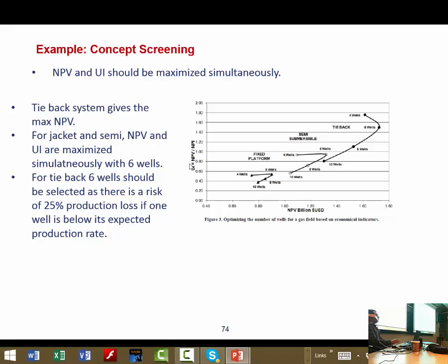It is the opposite: profit divided by the investment. Yes, profit divided by the investment. It's not exactly profit, because in this calculation you already have all the costs at the beginning, yes, minus. It's actually (A minus B) over B.